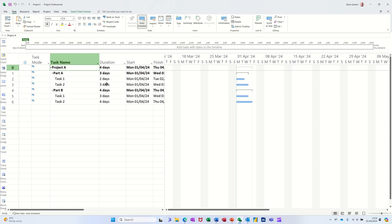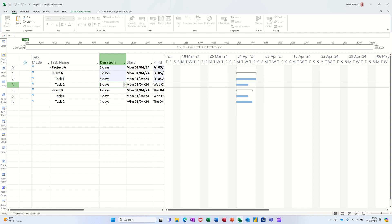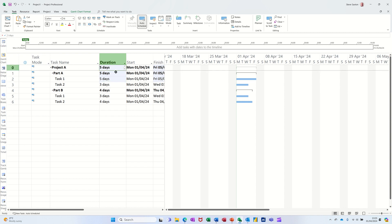Now the thing you have to be careful of, the way this is set up is that this bold area will pick up the duration of the subtasks that are underneath it. The project is picking that up as well. Now I cannot type, I'm trying to type on that duration on that Project A task and that's the summary of the whole project, it is not letting me do that.